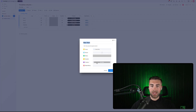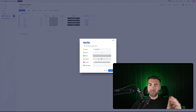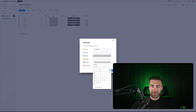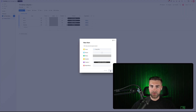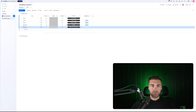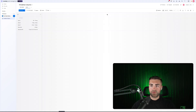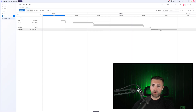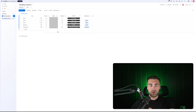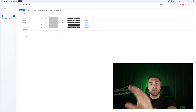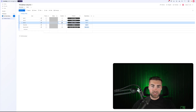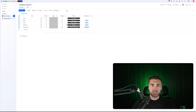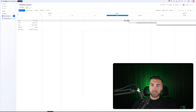Milestones appear on the Gantt view as diamond shapes. For example, if item four is set as a milestone on January 7th, using 'Auto fit' on the Gantt view shows the diamond. Tasks leading up to the milestone show what work is dependent on what. You can also have tasks continuing past a milestone, showing the full project flow on the Gantt view.